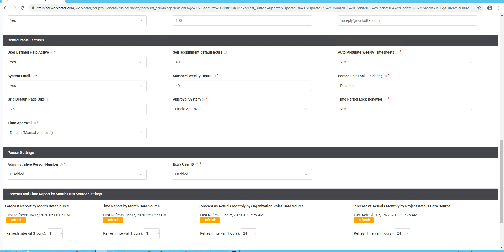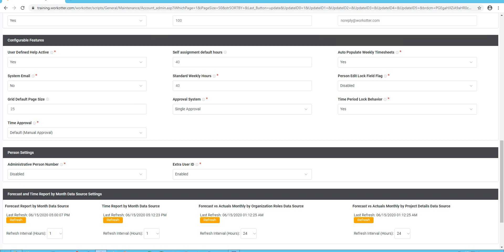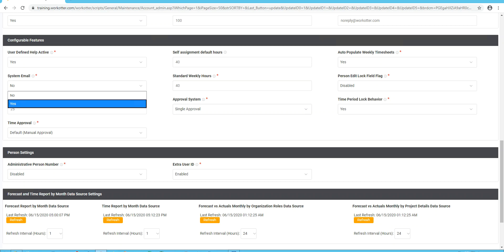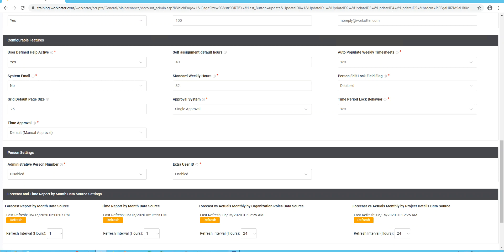Auto-populate weekly timesheets. We recommend leaving it at yes. System email. This might be turned off initially when you're first getting set up and we recommend that. Later, when you're ready to start the emailing that goes with WorkOtter, you can turn it back on. Standard weekly hours is when you create a new person in WorkOtter, what number of hours constitutes 100% of their time. So if you're tracking administrative time in WorkOtter, things like sick time, paid time off, could be vacation time, or perhaps you don't have administration time at all and you're not tracking meetings and things like that. So you might set this to 32 hours a week and that equals 100%. If you do have administrative time, then you'll probably want to keep it at 40 hours a week by default. Of course, on a person-by-person basis, you can change this as you see fit.